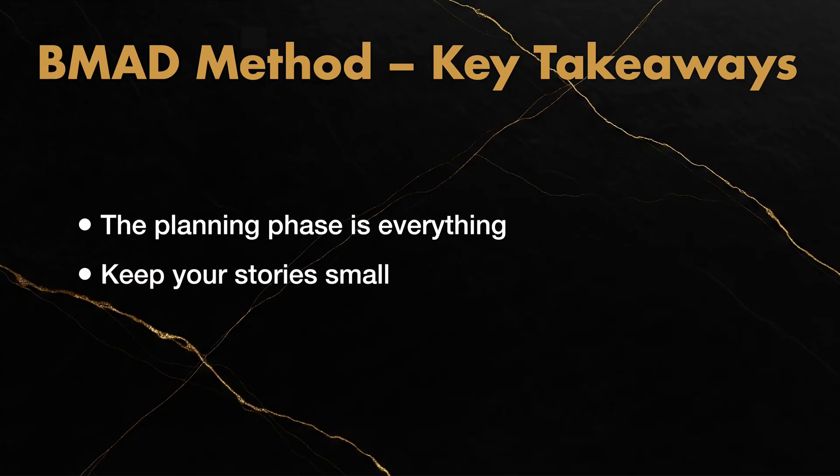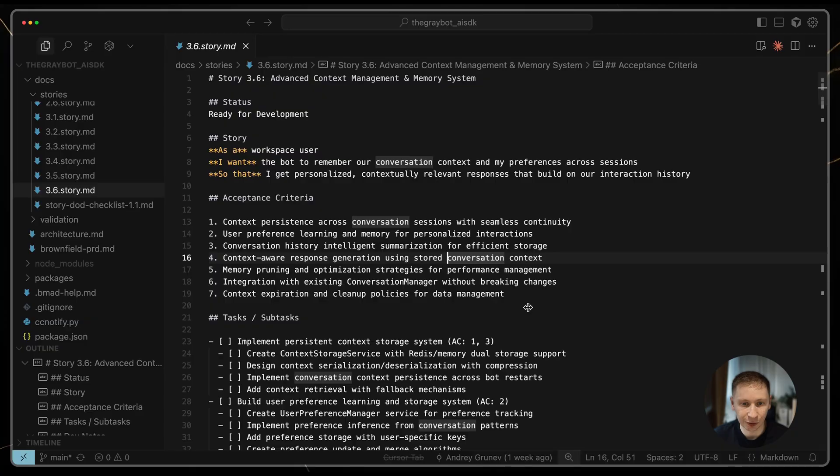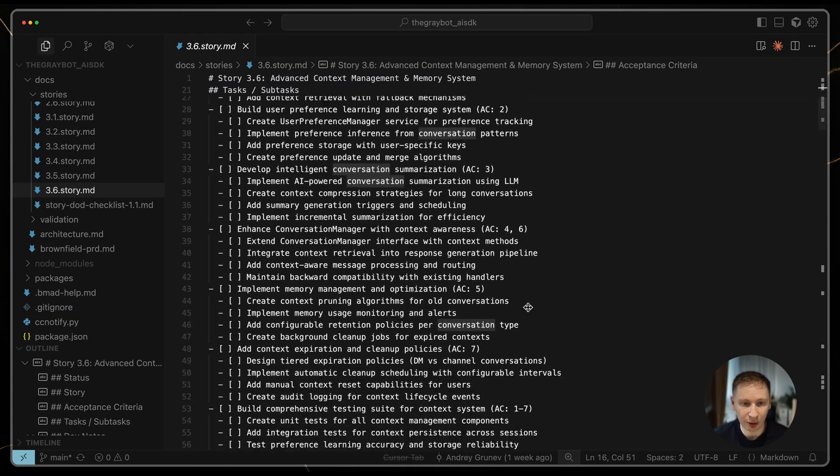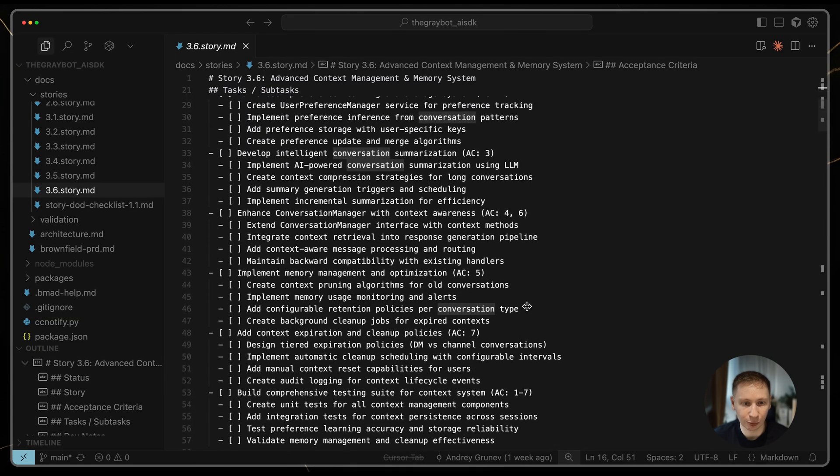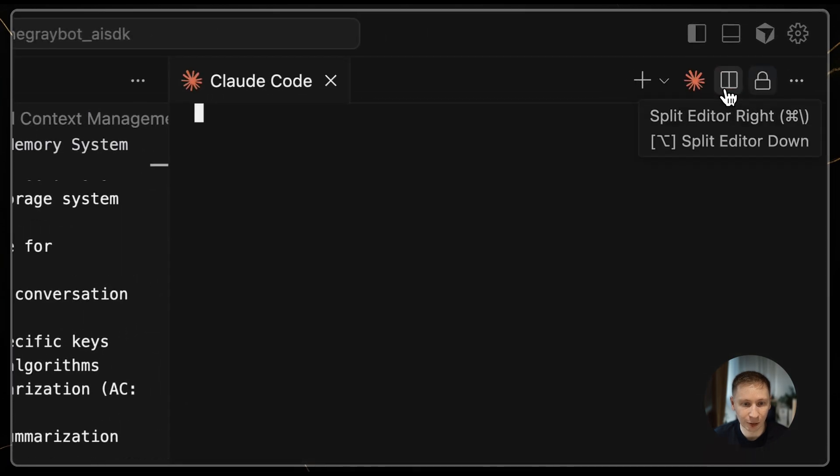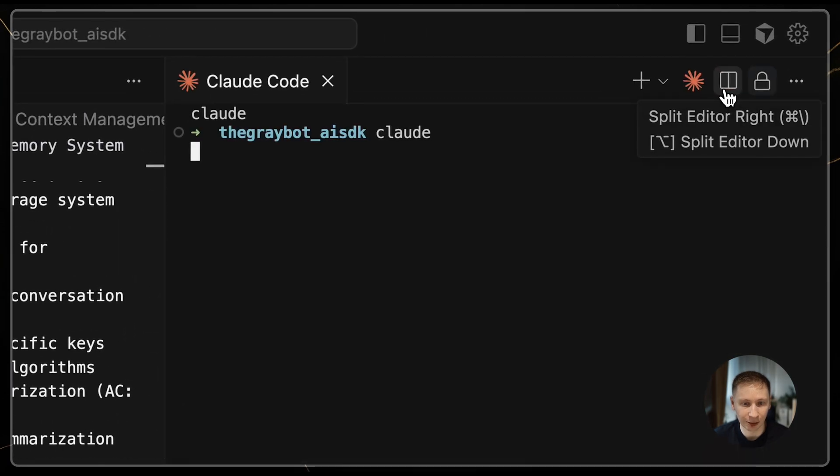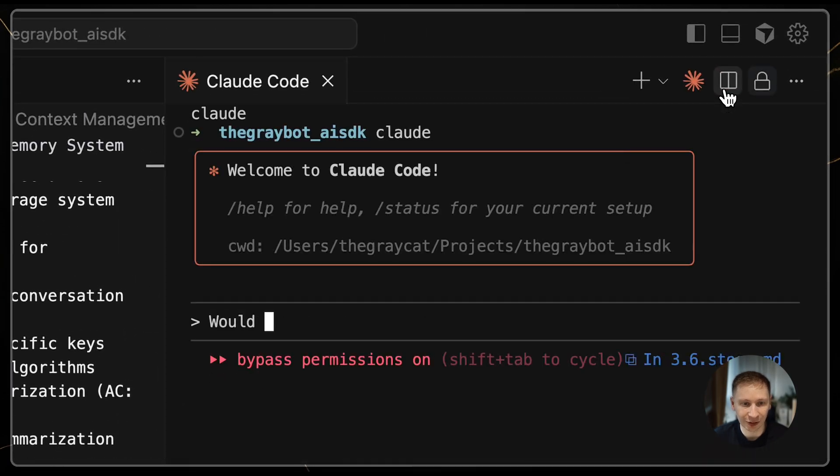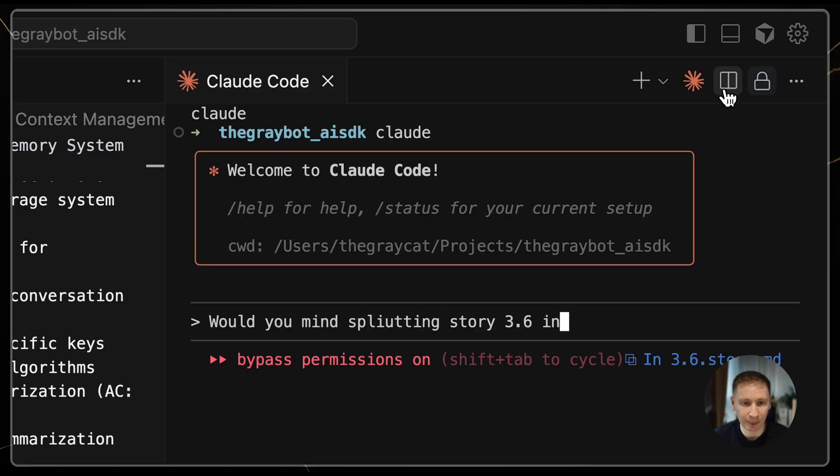Number two: Keep your stories small. If a story from the Scrum Master looks too big, ask for it to be split. A smaller task with a fresh context window will always produce a better, more intelligent result.